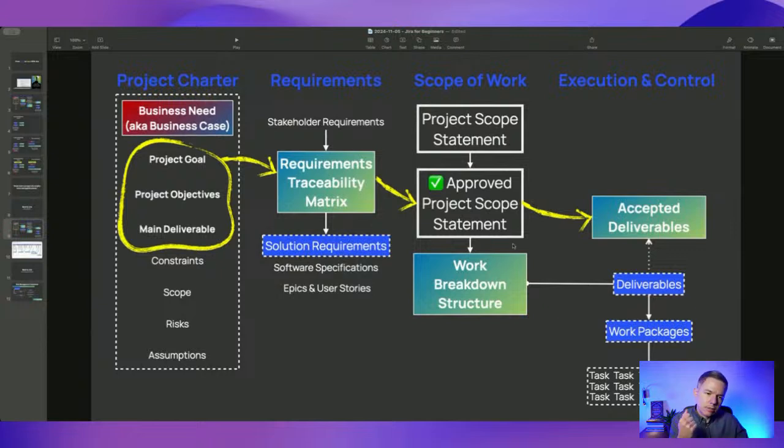Work breakdown structure is not that obvious. I would say if you use Jira and you want to use work breakdown structure concepts, you should, because it becomes very important on very large products. When your product is huge with lots of functionality, and this functionality is also huge, you should probably organize your requirements using the work breakdown structure ideas, where you have your product, you have your deliverables as main pieces or modules of your product, then you will have big pieces of requirements and so on and so on.